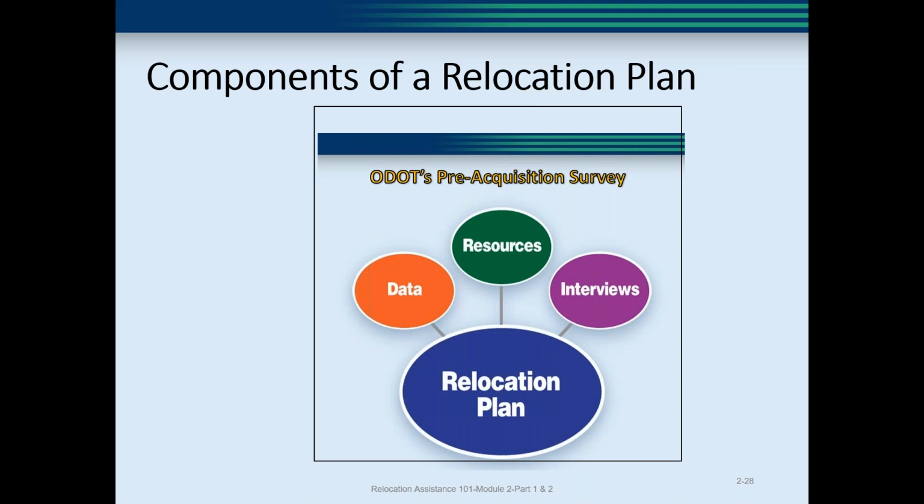The agency must also determine the availability of replacement locations for businesses, the farms, and any nonprofit organizations, including such considerations as zoning restrictions or the need for special accommodations, like they need to be near railroad tracks, shipping and warehousing, water and sewer needs.